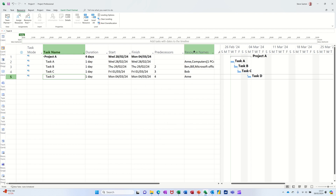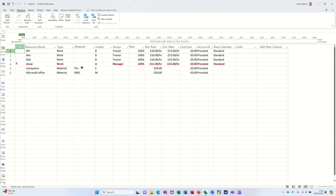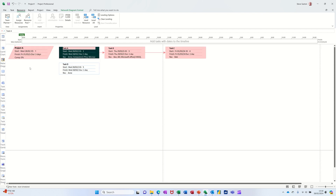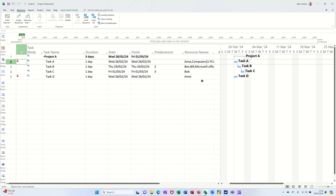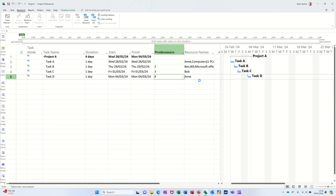So then what you're looking for is that you haven't got any red flags flying up there — those indicators mean that person is over-allocated. Now if I break this link, task D is going on at the same time as task A. Ann's on both of them — she's gone red. If I go back to the resource sheet she's showing red on there as well. You can't have any red — you need to sort it out on the Gantt chart. So I will undo that, and now she's not over-allocated.